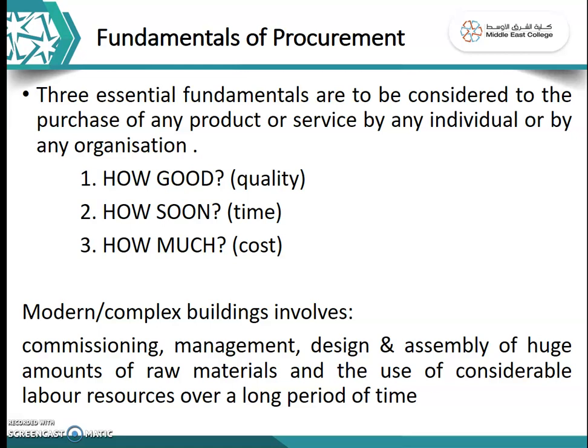For example, if the time is very less, the quality and cost have to be compromised. The quality might be compromised and the cost doubled or tripled according to the construction. So now, how soon it is, like time. Time plays a major role. Whether you have sufficient time to construct it pleasantly, or you need to plan various parallel activities, and you need to include a lot of manpower and a lot of material resources and equipment. So it obviously increases the cost.